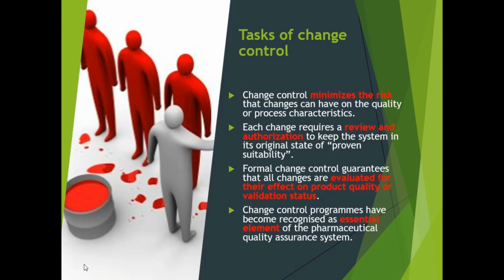So, tasks of change control. It's important to note that validated processes and qualified facilities can be very strongly affected by changes, so much so that the final product they produce no longer conforms to specifications with any degree of certainty. So your defects increase if changes are made. And the same is true for material specifications. This could call for a complete revalidation or requalification of your process or your system if your change control isn't monitored and controlled correctly.